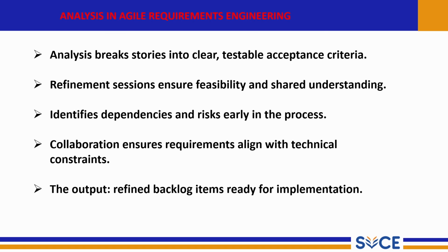And the next phase is analysis in agile requirements engineering. Analysis breaks stories into clear, testable acceptance criteria, and it gives refinement sessions to ensure feasibility and shared understanding.